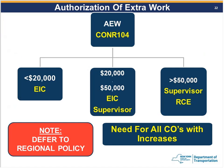The AEW has dollar thresholds that determine required signatures: under $20,000 requires only the EIC; $20,000–$50,000 requires the EIC and supervisor; over $50,000 requires the supervisor and the Regional Construction Engineer. Note that regional policies may be stricter — in Region 2, all AEWs require at minimum both the EIC and supervisor signatures regardless of value.